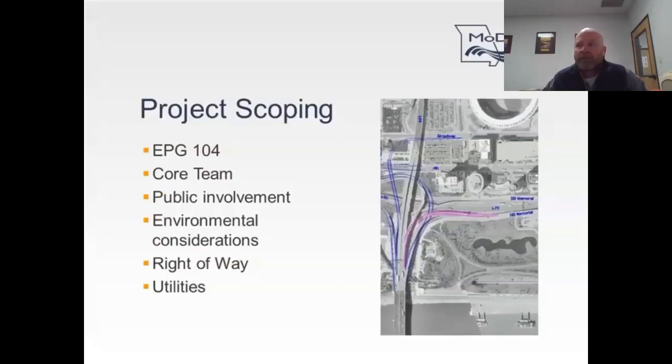This step will also include analyzing risk to the project, like environmental considerations, right-of-way, utilities, railroads, and public involvement. These risks could impact what solution is selected for the project. These risks will also determine the schedule and budget for your project.